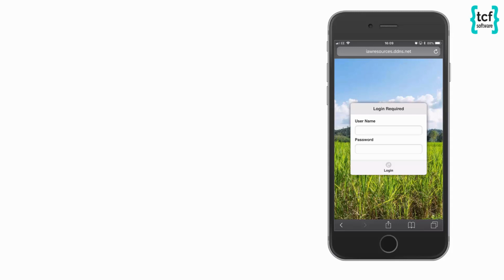You did ask for some extras while we were going along. One was language translation, which unfortunately we'd already built the UI in stage 2. So we couldn't really build that into stage 3 without refactoring the UI. We really needed to know about language translation right at the start. But we can, however, move on to that in the next stage and go back and refactor it and re-engineer it into the back end that we've built. So that's not a problem, but it's going to have to be an additional job going into next stages.